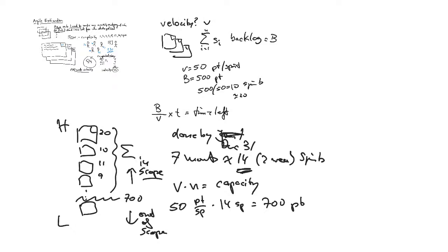So by calculating my capacity and then making sure my capacity is greater than the sum of all the story points that are supposed to be in scope, I know what it can realistically accomplish. Now, of course, somebody might say, well, that's great, but there's some stories down here that I really, really, really want. How do you get them? You have to move that watermark. You got to move that watermark somehow.